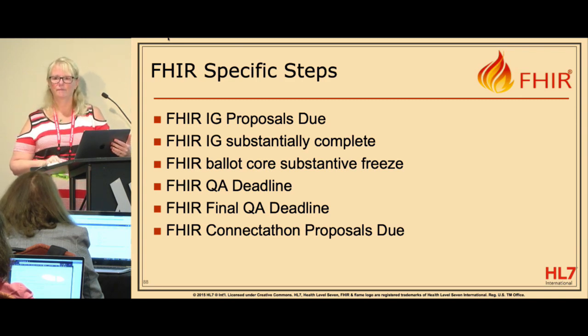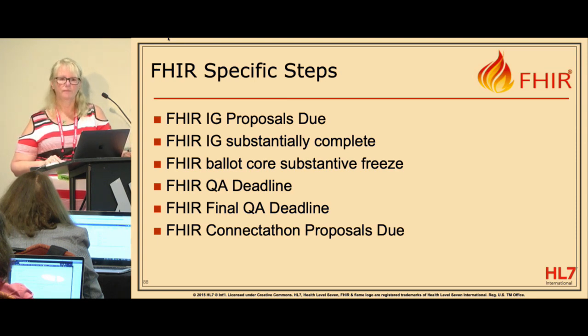And they have the right to say, no, sorry, you can't take on any more until you either close or do something with the ones that you've already got in process. So that's part of what the PSS process is actually about: prioritizing and helping to manage workload, and also to ensure that there's visibility into what people are doing.